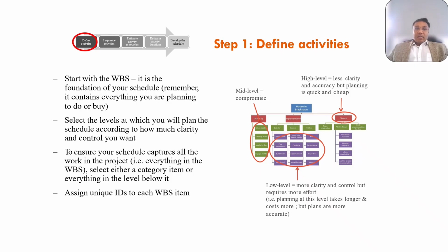The first step in developing a schedule is identifying activities. Identify all tasks needed to complete the project. This involves breaking down the project into smaller, manageable units of work, often using the WBS. Activities are further broken down from the work packages.